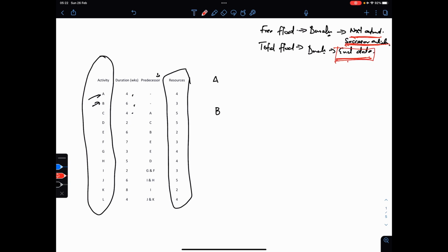So when you're doing your critical path analysis, any of those activities that have a total float of 0 will be on your critical path. So that's called the critical path. We're still going to get there. I'll show you how to do that, and I'll give you the formula, so just bear that in mind.